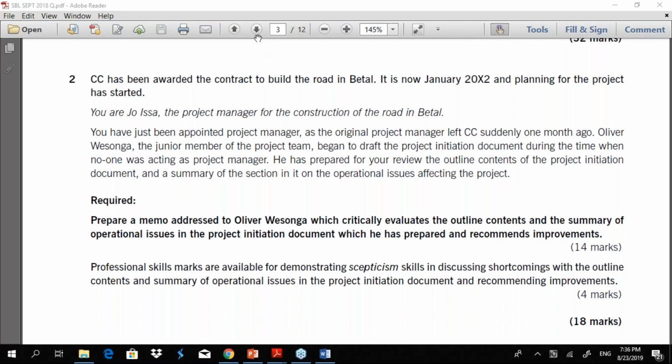Right, so a PID is a formal detailed document which contains planning information extracted from other sources such as your business case, which is your business proposal, the dissemination plan, risk assessment, and also your Gantt chart, that is timeline. And it will include all information necessary for you to implement the project or execute. So that's what a project initiation document is, a document that will help you to initiate the project.